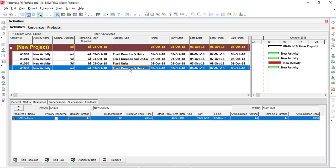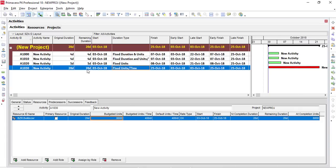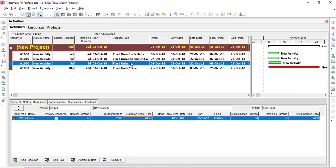Option four — Fixed Units and Time — is similar to Fixed Units, but here we fix the unit time. This means you have to increase resources to shorten duration. For example, if units are 8,000 with one machine, the duration extends to 20 days. Even though it says Fixed Unit Time, you can still change it, but it's an indication that resources are limited. The unit time is their default and maximum — you can't change the number of resources; this is the only resource available, so you'll finish in 20 days.